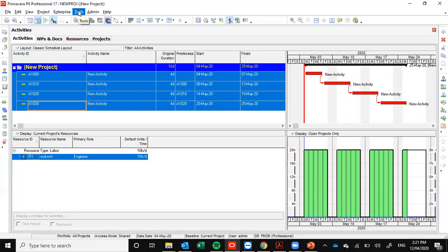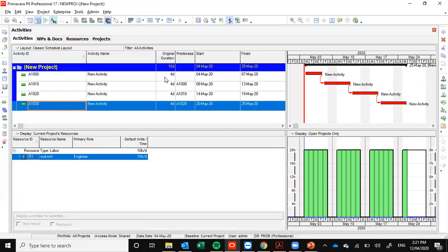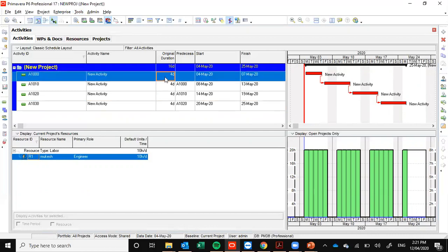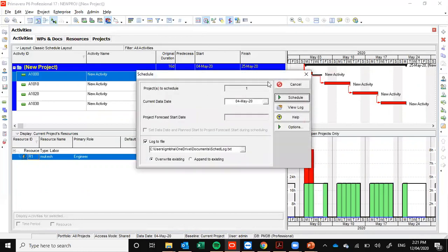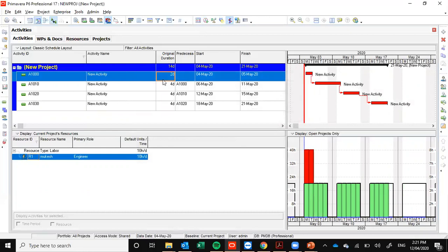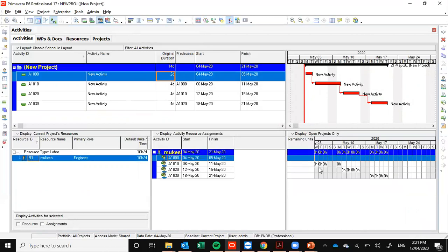Then what is manual leveling basically? In manual leveling, there is a theoretical concept derived from the PM book. We can say stretching and crunching. Simply, if I say, or if management demands, that we have to complete this first activity in 2 days, it means we have revised some planning. So it looks like that. If you have a 2 days job, then you have to utilize again 40 man hours per day, because you can see it from the spreadsheet also.